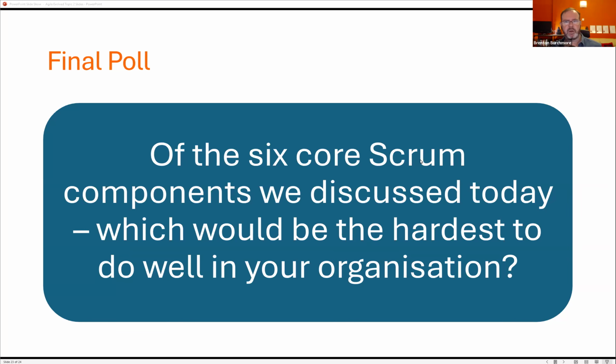What does that mean? Well, the Scrum Master's job is to say, right, Fred, I'm going to ask you to just take on 1 week's worth of stuff, and then you're going to have a one-to-one with the customer out of sequence, only you. Or we're going to represent you at the meeting, and then when you come back, you will have a one-on-one with me to pull a week's worth of work out of the sprint run. Or we're going to say, you've got 2 weeks, and you're going to figure out now at the beginning of this sprint what your 2 weeks' work is going to be. Half of it's going to get done this sprint and half next sprint, and you're not going to talk to the customer until the end of that 2nd sprint. You're literally blurring 2 sprints into one, Fred. That's how it's going to work for you.